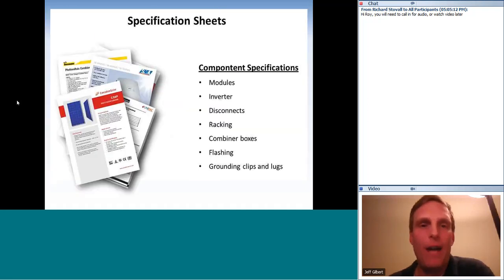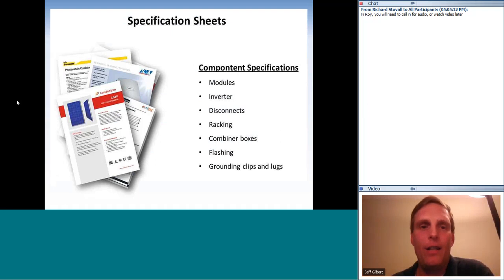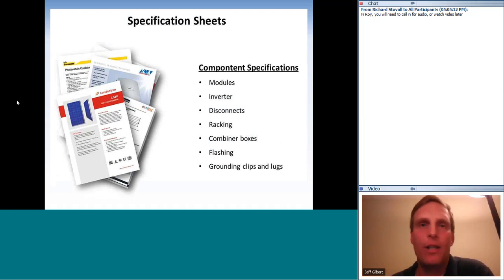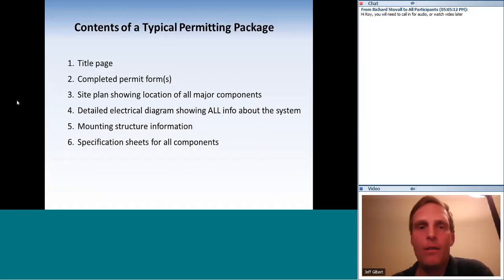Spec sheets cover the modules, racking, inverter, disconnect, and anything included as part of your system. If everything is from existing manufacturers designed specifically for solar installation, the permitting process should go pretty quickly. If you're using your own custom racking system it may take a bit longer. Permits should always be posted in a conspicuous location.